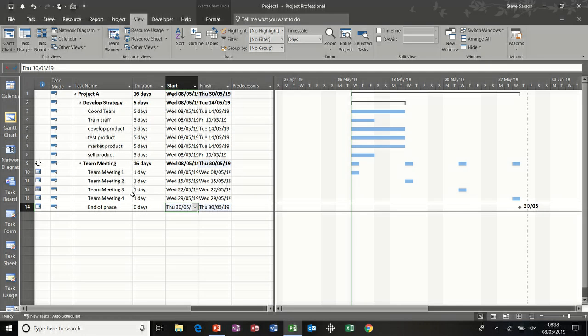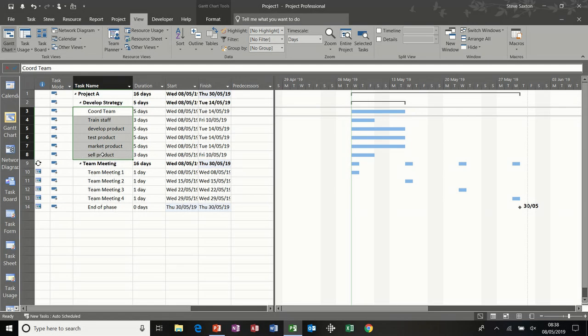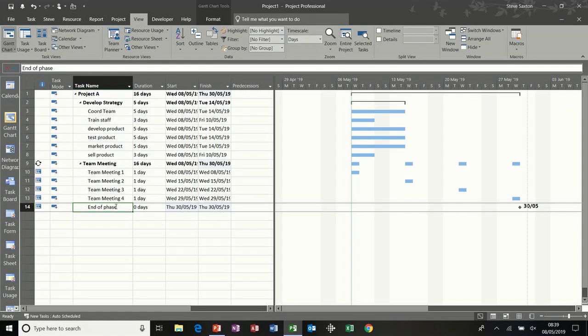Project likes to schedule things. It likes to schedule things based on durations and links. So if you intervene and change a date, it then becomes, in project terms, slightly more important than any of these tasks in this example, because we haven't changed any dates. Okay, so that's the first stage typed out.